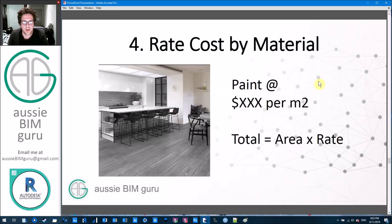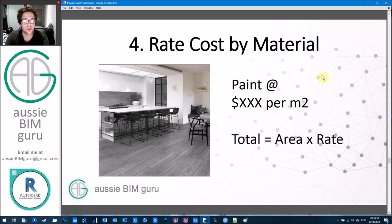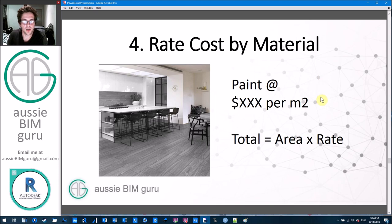On to the last technique. This one's pretty hard — I'm not going to go too far into it, just show you that it's available and works if you know what you're doing. Essentially this is a rate cost by material, or a material takeoff. It's very complicated and relies on setting up your materials really well, knowing where they're applied, and making sure your elements are modeled correctly so all the exposed face of material is true and correct.